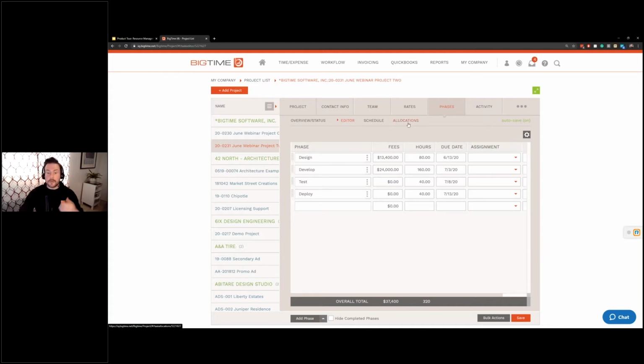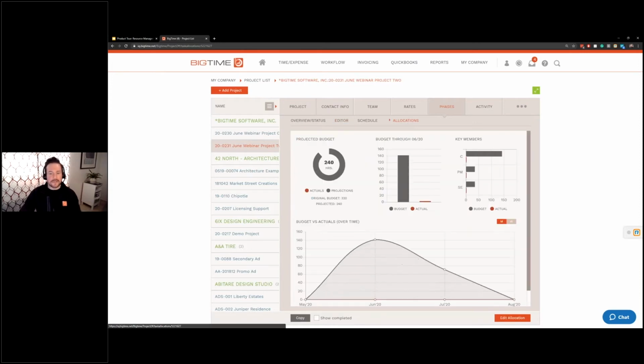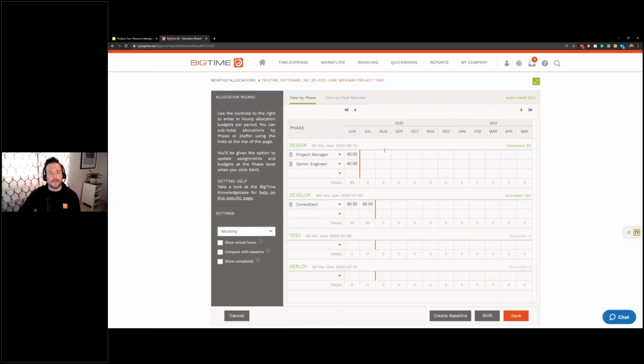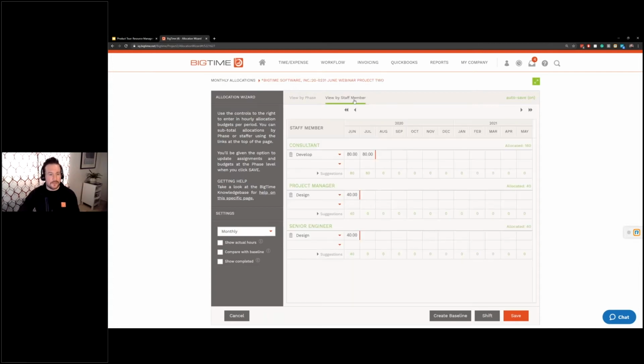Great. Continuing on from there, we've been able to scope this out, identify our bill rates, forecast out the need. We'll land on some reports at the end to look at that demand in a little bit of a different way. But as I mentioned, we can use BigTime to now come in and say, I know I need that PM for X amount of hours. Who should it be? So when we're on this allocation screen, we can flip the view. So rather than view by phase and role, I'll view by role and phase, right? So in this case, I need that consultant for 80 hours in June and July.